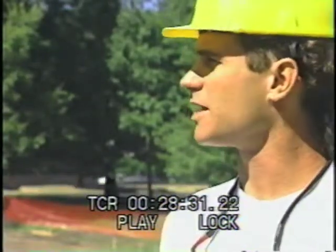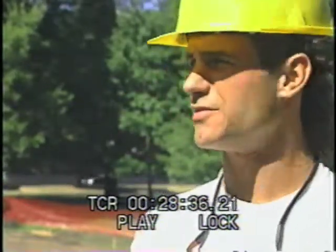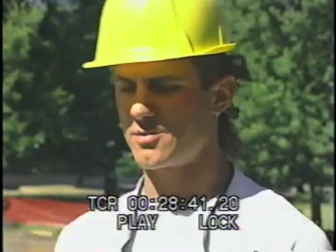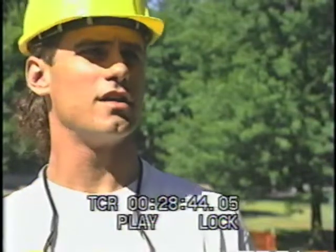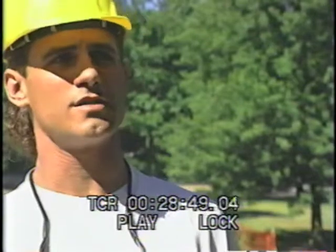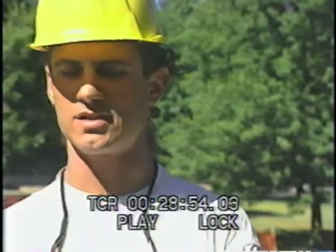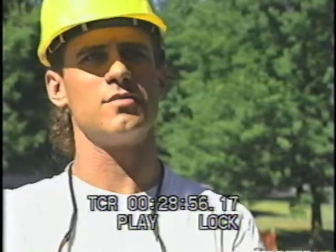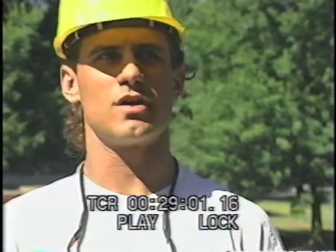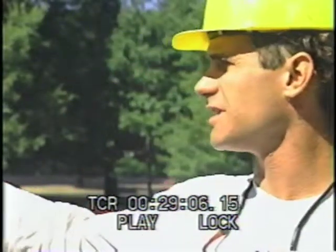So we're looking at doing a project next year in Springfield, perhaps, a band shelter, a pretty large-scale project. It would be even more ambitious than this. And if we do that, we'll have to have some of the roof pieces pre-manufactured in a local shop. I'm thinking that maybe some of the students can go over and work in that shop on their table, using their nail guns and things like that, building these big pieces. Then when we get out to the site, they'll get craned into place. Depending on the type of project, there are definitely places where some pre-assembly makes a lot of sense, or the use of a pre-manufactured component, like these glue laminated beams.